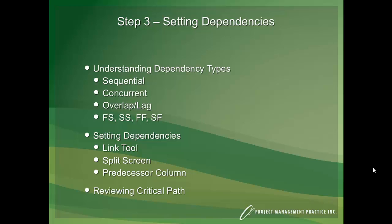We've already gone through Step 1, which is all about creating the work breakdown structure, which represents everything you need to do to accomplish the project. And once you figure out what you need to do, then Step 2 is all about figuring out how long each one of those things take.